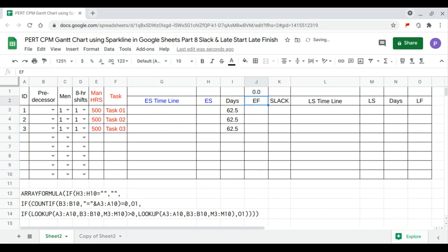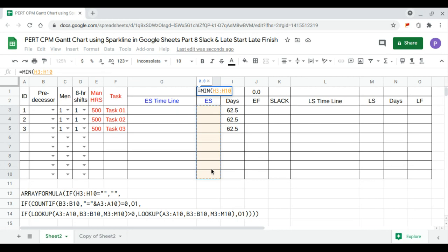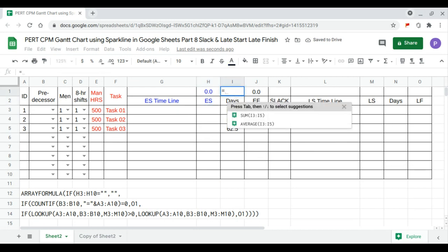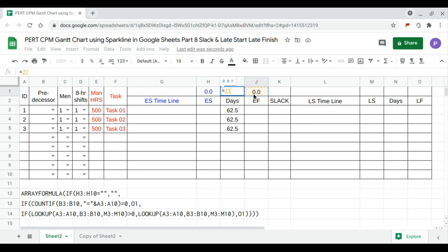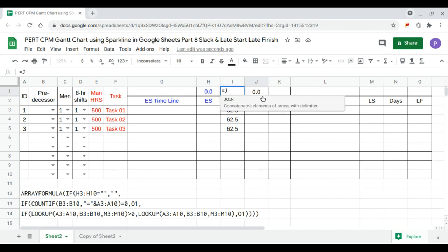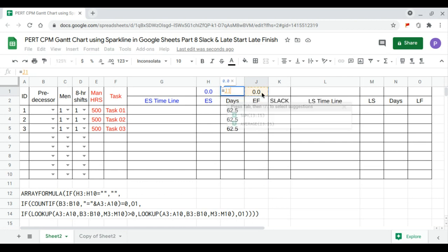The early project finish is the maximum of the early finish column, and the early project start is the minimum of the early start column. The total duration is equal to the project early finish minus the project early start.